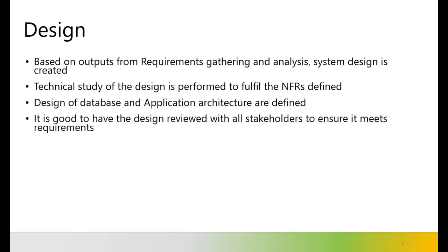We have our requirements that are gathered. We know what is expected from the user. We do a technical study of all the material that we have gathered so far. We try and start designing the database and application architecture, which would be the guiding point for the next phases, the implementation phases, when the developers actually start working.